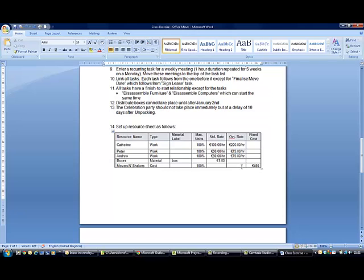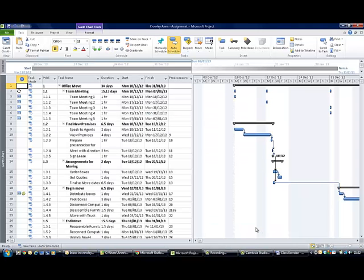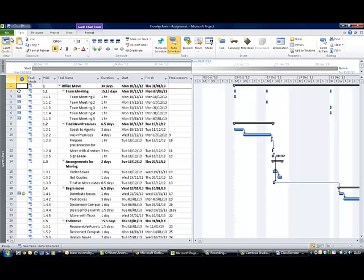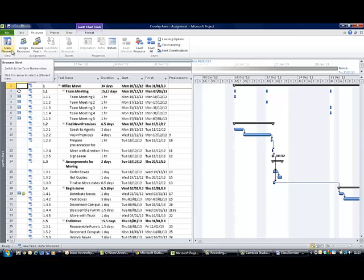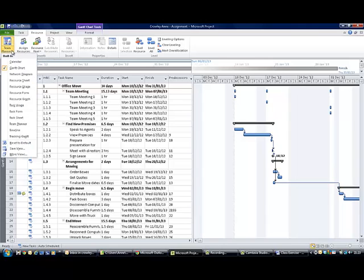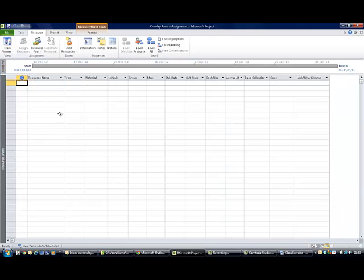We'll be assigning those resources subsequently. If your file's not open you open it, and you'll be looking at a page something like this. What you want to do now is go to a tab up here on top called the Resource tab. So you click on the Resource tab, and if you click on the button there on the left-hand side, you'll get the option to choose Resource Sheet. This is where you enter your resources for your project.